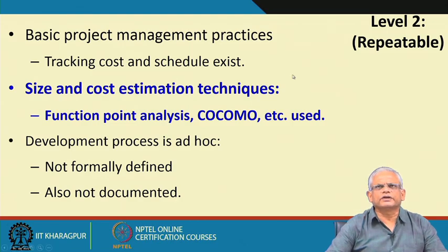One of the major requirements of level 2 is project management practices, that is making the basic plans and then monitoring against the plan, tracking the cost and schedule. Size and cost estimation techniques are used by the project manager: function point analysis, COCOMO, etc.